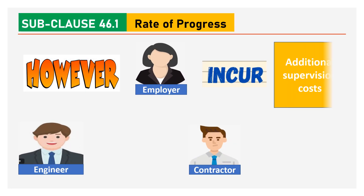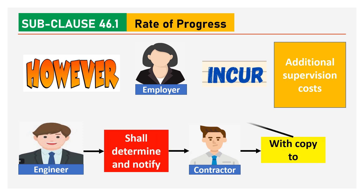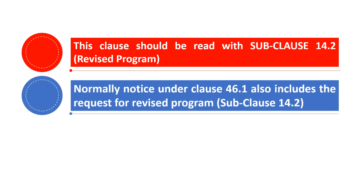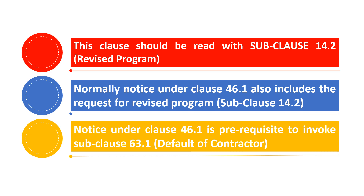However, if the employer incurs any additional supervision cost, the engineer shall determine the same and notify the contractor with a copy to the employer. This subclause should be read with subclause 14.2 on revised program. Normally, a notice under subclause 46.1 also includes the request for a revised program under subclause 14.2. Notice under subclause 46.1 is a pre-requisite to invoke subclause 63.1, i.e., default of the contractor.